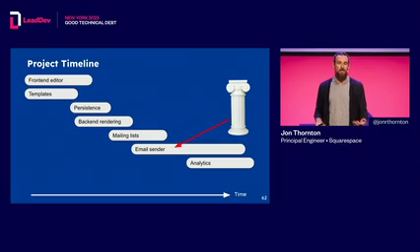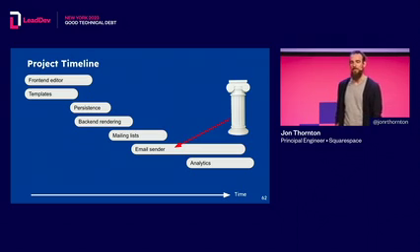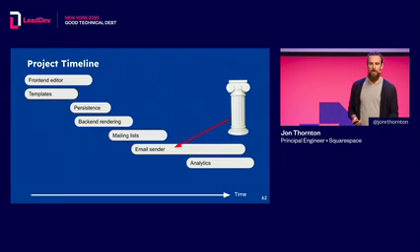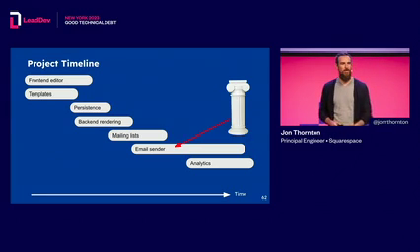So our team had scoped out email sending as a big pedestal. The final product needed to be capable of sending billions of emails quickly and reliably. Fortunately, several members of our team had built something like this before, so we weren't too worried about it. Still, we didn't want to wait that long to find out if people would use our editor to send email. So we knew that our coworkers on other teams could make good test users for the email editor, so we asked ourselves, what's the simplest thing that we could build to make our editor useful to our coworkers?